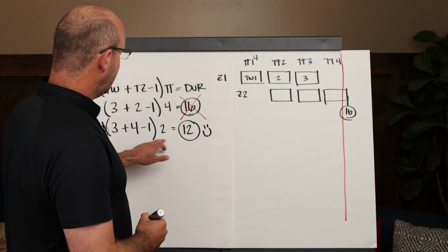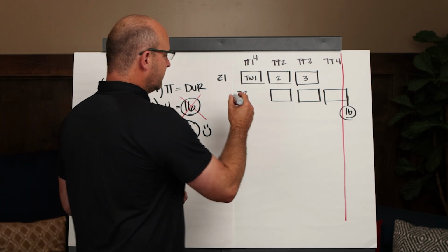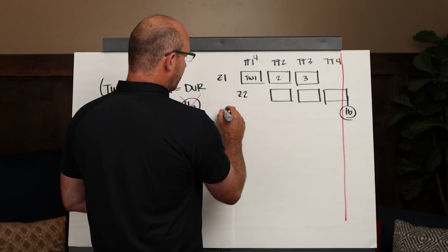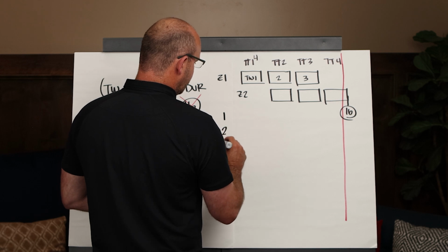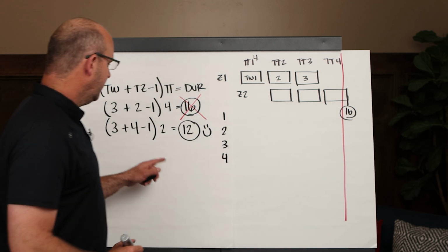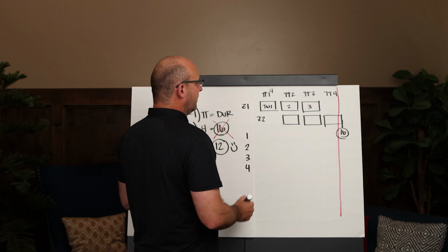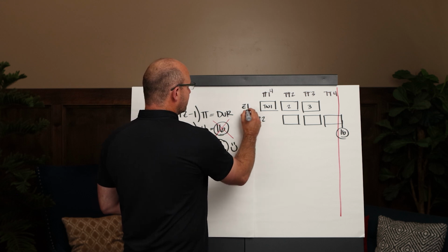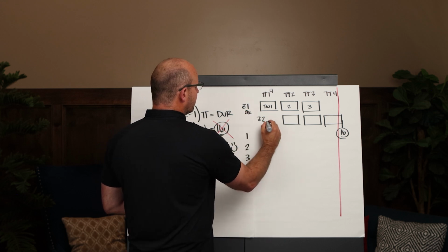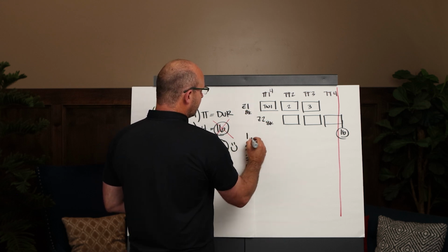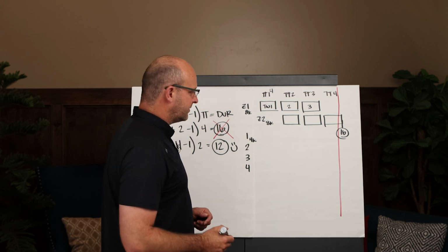So let's go ahead, after we did the calculator, let's go ahead and draw this. So let's say we have zones 1, 2, 3, and 4. Remember, because we split those in half. So let's just make it easy. Let's say that these were on average 8,000 square feet. Now they're 4,000 square feet. You cut the zone sizes in half.